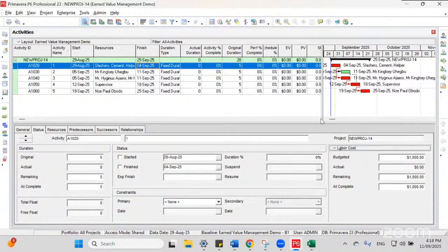So I'm trying to see here, we can't actually get the actual cost from the schedule. What we have is the planned cost from the schedule. You have to assign the baseline and update. We get the actual cost from other stakeholders, quantity surveyors or the finance department, because they know how much they have paid.